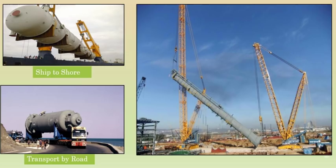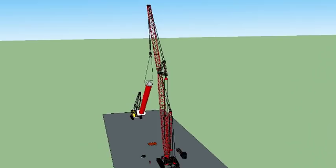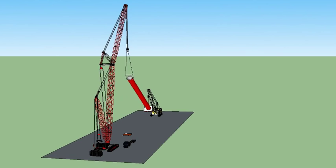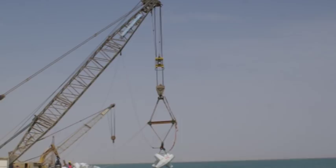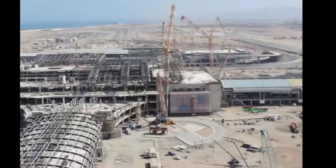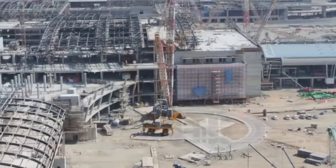Heavy Crane Lifts. Prefabricated tall standing vessels or columns are lifted from the horizontal position and rotated into the vertical position using two cranes. Shown are cranes used to build a seaport. Also shown is a crane lifting a 200-ton roof truss.